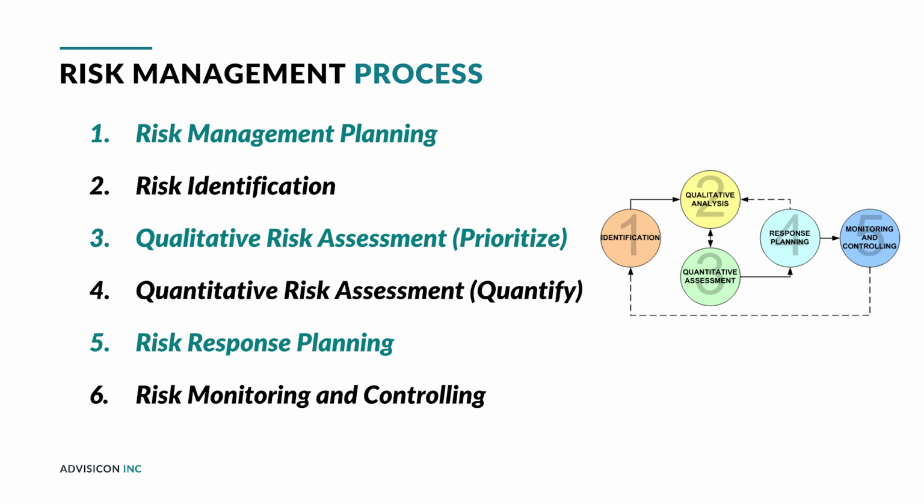And then the final piece that I brought up earlier, the contingency. So make sure you have contingency built in. So you do contingency planning. You account for buffers in budget or time in your schedules, just in case of the unforeseen, unknowable, unforgivable type events that may come up during your process or during your project. So make sure you do that.